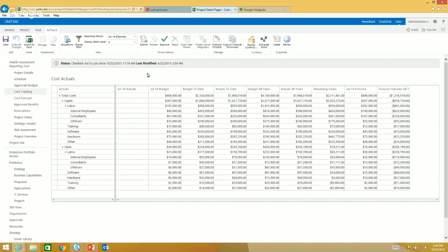360 also includes an import mechanism from SAP, Oracle Financials, and others to simply pull through the actual costs for all in-flight projects for each period. So often you would expect this actual column to be already displaying the actuals from the ERP system, but of course it could be manually entered or even imported in from timesheets too. But in this view here, you're simply going to expect the actuals to be captured, and then variance will be generated based on budget, to date, period, whatever is needed.